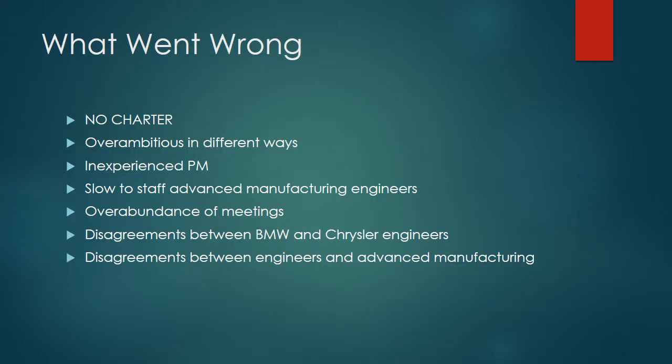What went wrong on this project? There was no charter whatsoever. A charter has been explained to me as being like a birth certificate for a project. It's pretty crazy to think that a huge endeavor like this that's hundreds of millions of dollars proceeded with no charter. The project was also pretty overambitious. It encompassed research and development, designing the engine, manufacturing it, building the plant, and taking it to market. Each of those things really could have been its own project.